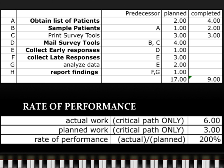The first example is listed here. The planned values have been recorded and the time needed to complete the first three tasks are also listed. The manager wants to know if the project will be completed on time. Rate of performance is the first step. To calculate the rate of performance, we need two values: the actual work time and the planned work time.